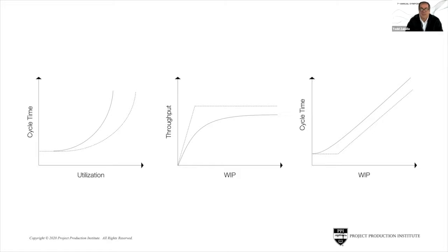All right, so any of you guys that are playing around with the industrialization of production, throughput is a measurement, cycle time is a measurement. You cannot do anything with those other than look at them and read them. All that you can play with is utilization of the capacity, management of inventory, especially the WIP, and what you're doing with variability. Okay? Cycle time is a function of those, and the throughput, the amount of stuff you get out of the system, is what you're doing around capacity utilization, WIP, and management of variability.